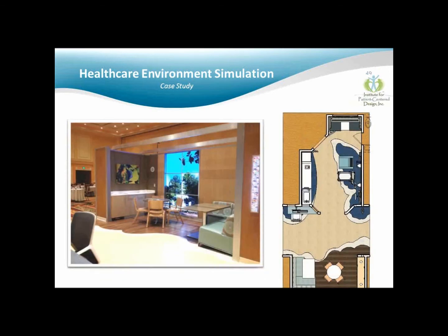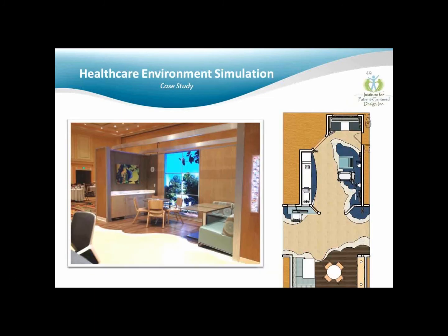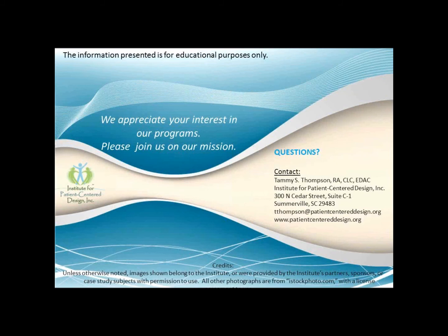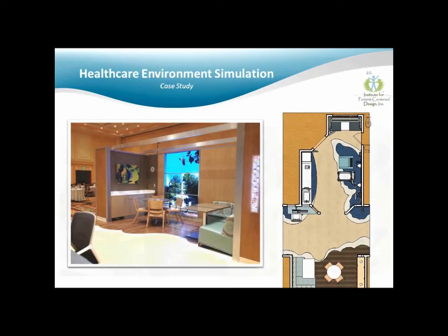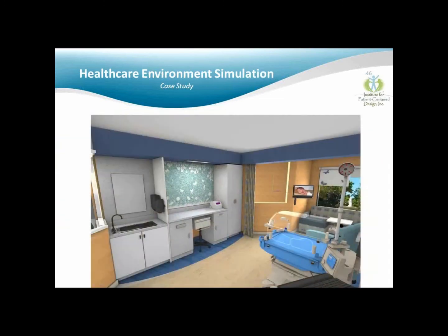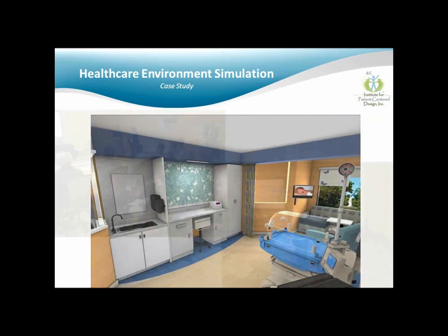Okay, next question. You mentioned that the Center for Health Design mockup would have cost $200,000. How much did the VR environment cost? In the end, it was about 10% of the quoted $200,000 for the mockup. So again, we spent probably 4 or 5 days, maybe a week max, of art work, getting their BIM file translated over with the exact design features and callouts and interactions that they wished.